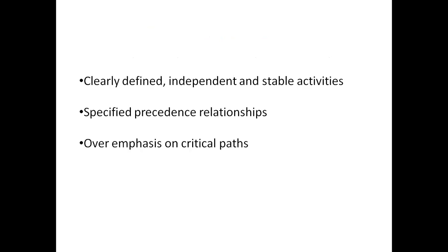And again, there are some limitations of PERT and CPM. One is clearly defined, independent and stable activities. These techniques can only be applicable to activities which are very clear in their nature, independent and stable. There should not be any volatility, changes or flexibility in the activities entertained in the PERT and CPM techniques. Then a specified precedence relationship among the different activities must be there. Only then can these techniques be used.